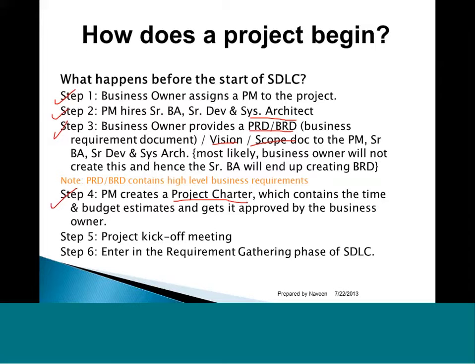And then, if you are trying to obtain your PMP certification, there is an important question in there. When will a project manager be given formal authority on a project? When the name of the project manager is mentioned in the project charter and when the project charter is signed off by the business owners or sponsors. That is when a project manager will have formal authority on the project.